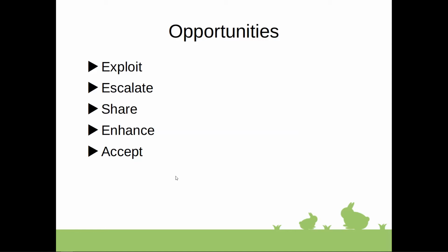An exploit would be a response strategy whereby the project team will act to ensure that the opportunity occurs. Essentially, that means the team would be actively aware of a specific opportunity and work towards making it happen and taking advantage of the outcomes of this particular opportunity.